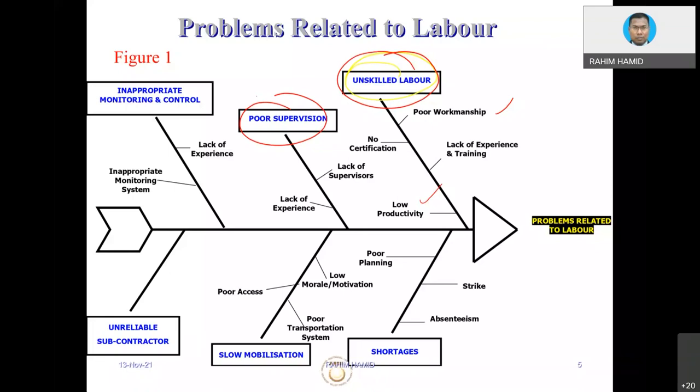And then there could be unreliable subcontractors. Right now, we are getting the workers instead of subcontracting the work to a subcontractor. Now we are getting just the workers. So just imagine if we are getting very lousy workers, then not much we can do. If for instance we subcontract the job, the work itself, then we can do something if the progress is not up to a certain standard. But since we are getting the laborers, it means we are the ones that have to manage the issue.